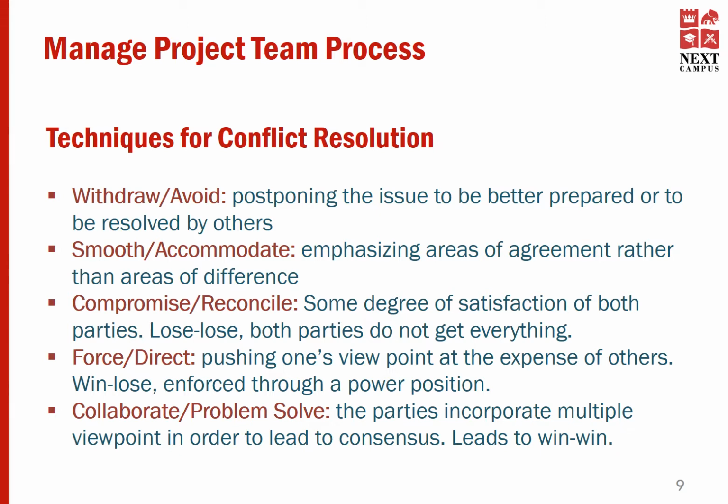Third technique for conflict resolution is compromising or reconciling. And this is actually some degree of satisfaction of both parties. And since both parties do not have all they want, this is a lose-lose situation. Fourth technique for conflict resolution is forcing or directing.